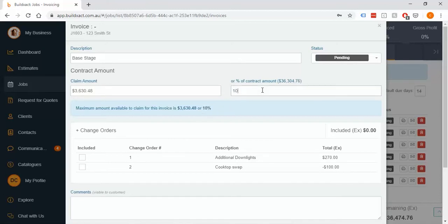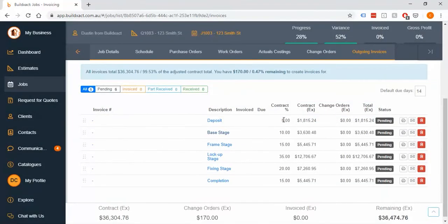But one thing I really want to stress here is often people will come in and go right to this stage and say, all right, it's 20%, and it doesn't go that high. And we'll get a call saying, hey, why can't I change it? And the easy answer is that all of these have to add up to 100%. So you can't leave without making it over or under. So if I need to add somewhere else, I have to make sure that I reduce it elsewhere and rejig it, making sure it ends up at that 100%.